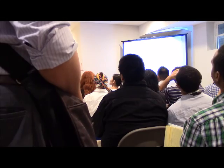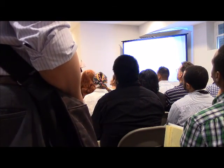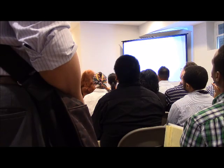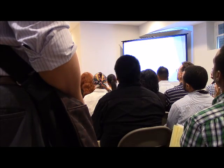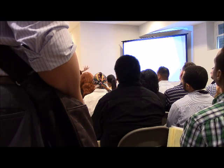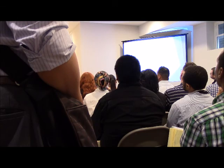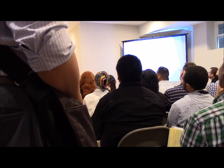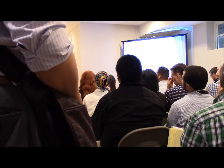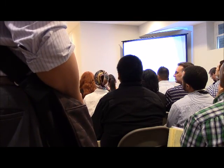When you're building new construction, you also need to send letters to the adjacent properties, making them aware that you are going to be doing new construction. So there is a process with that, and you send out a letter. Very simple, and it has to be certified, so they sign for it. Certified letter, just to protect your assets, essentially.